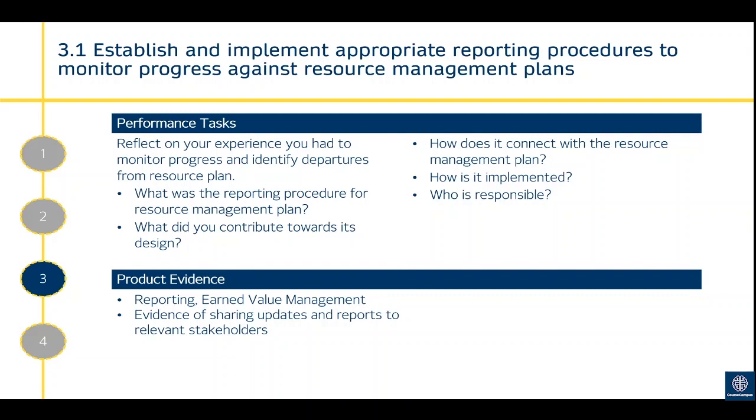So for this, you're monitoring that resources are being used at the correct level. It could be an issue if there's too many resources being used, and equally it could be an issue if there's not enough resources being used. If there's not enough resources being used, that could mean that your project is behind, so you maybe want to look at the schedule, or it could mean that the project has been delivered to a lower quality or a lower standard if resources haven't been used appropriately.